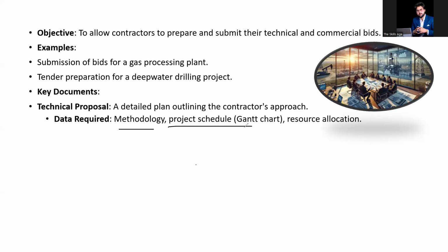Project schedule: I have just shown you, as per Primavera P6 or Microsoft Project, whatever, because this is the tendering stage, so you don't need a detailed project schedule. Resource allocation: at this stage let me clarify that resource allocation is not required. Resource allocation will be required when you are going into planning, once the project is there. You can submit an Excel report on this, that your major resources, maybe 15 to 20 resources only, on Excel, that these qualified resources you need to build this project. That's it. No need to allocate these resources on the Gantt chart at this stage.